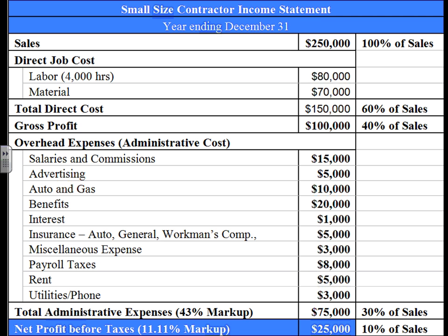Now, if you look at, guys, the markup is for the break-even value. Can I get you to understand the percentage of the profit is applied to the overall sale number of that project. The markup is applied to the break-even value. And there are two different values, guys. I'll show you the multiplier. So in order to get 10% profit on the overall of this project, Darren, you have to apply 11.11% markup on the break-even cost. Did you guys hear me? So that's probably the most confusing one.